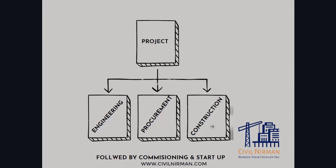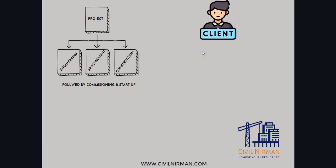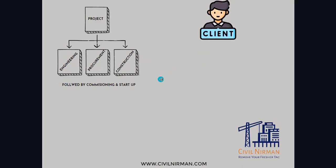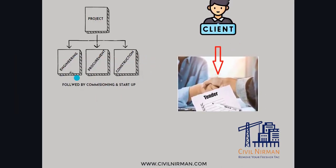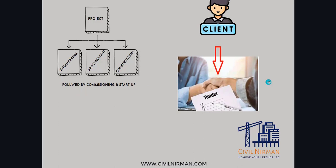Let's understand this through an example. Let's say we have Client A, or Owner A, who is investing money to develop a particular industrial plant. In order to construct this plant, they go through all three phases — estimation, engineering, procurement, and construction. They will float a tender, and companies working in this space will bid for it. Based on the lowest bid, they hire a particular company to complete the engineering part.